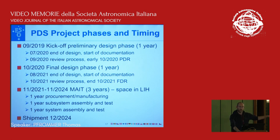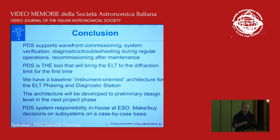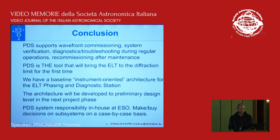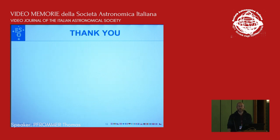Then first system assembly and test, one year of system assembly, December 2024 shipment, and then the first few months of 2025 for installation — first at the IAA and then on the Nasmyth platform — followed by some verification before it will be used. To conclude: the PDS supports wavefront control commissioning, system verification, diagnostics, troubleshooting during regular operations, and recommissioning. It's the tool that brings the ELT to the diffraction limit for the first time. We have a baseline architecture and are currently in preliminary design phase. PDS system responsibilities are in-house, with possibly the visible imager as a standalone item that could be outsourced.